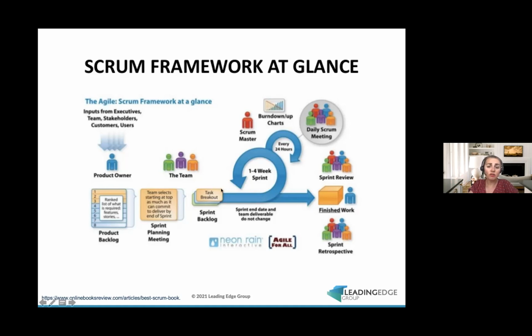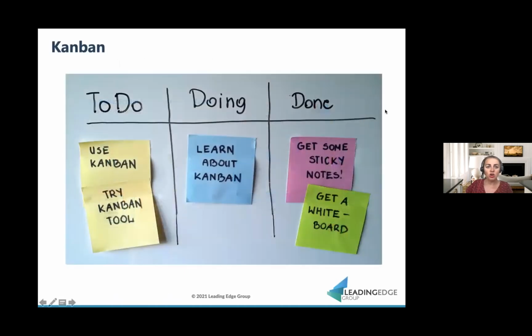And at the end of every sprint, we are expected to deliver a tangible, potentially shippable product or work increment. So it might not be perfect, it might be far from perfect, especially early in the program, but it's something that is done and it's tangible. So we won't have a sprint called analysis. We won't have a sprint called design. That's not how it works. Every sprint we are expected to provide something tangible. So that's obviously a very, very brief summary.